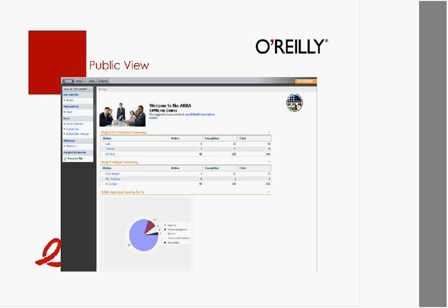And then another thing we did is we had to develop workflows for publishing data based on the ARRA guidelines. Again, a quick example, if somebody entered in how much they've spent or where they're at in the project, the last thing we want is them putting wrong information. So there's some kind of workflow or approval process before this gets pushed out to the greater public.